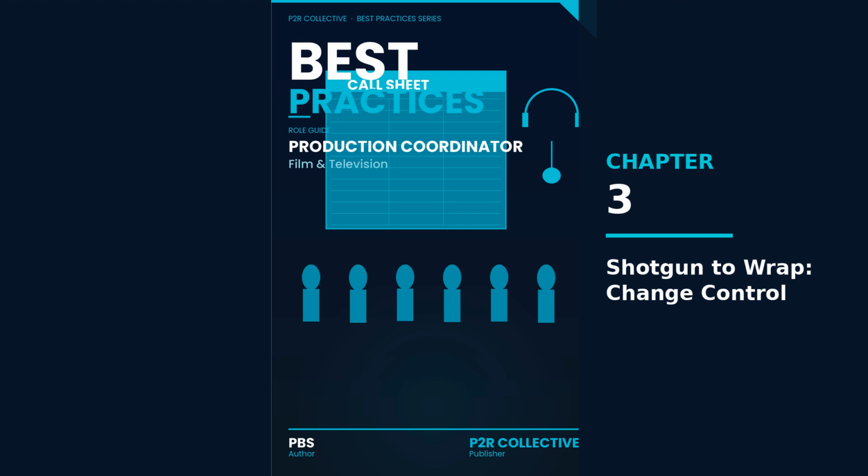6. Lock your status rules for today and reshoots. Decide how your team should mark progress while the schedule is unsettled. For example, if you hold, mark impacted shots as held, not done. If you reshoot, mark them as reshoot requested with the original take reference. Why this matters: you protect tomorrow's workload planning from today's confusion.